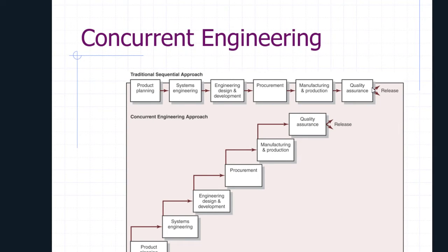The whole idea of those, just as with the trench example just now, is to take something that would traditionally be quite sequential and turn it into something where you've got some parallel working taking place, what we call concurrent engineering. So what this enables us to do is hopefully complete projects more efficiently, quicker, and meet the customer needs much, much better. So it's really, really important to do that.